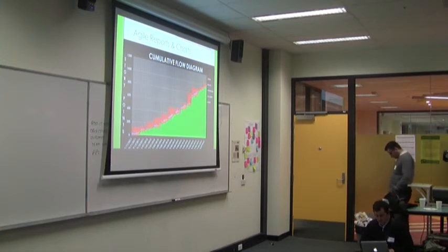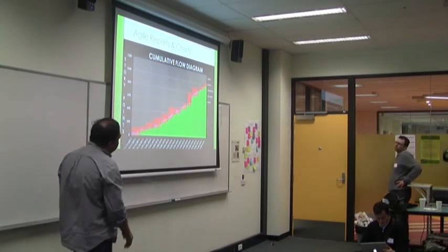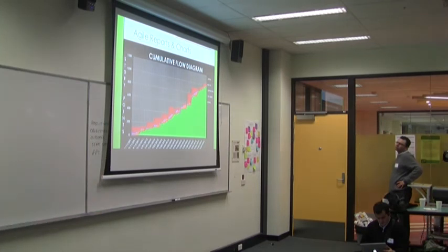We got it pretty much at the end of each sprint. But that's anyway, my cumulative flow. It just shows you, what you want is a nice straight line, straight line, straight line for each of your processes. And this cumulative flow supports the Scrum task board. So you've got the same states, which is to do, in process, to verify and done. But you would have this with the same amount of states that you have in your workflow on the wall.